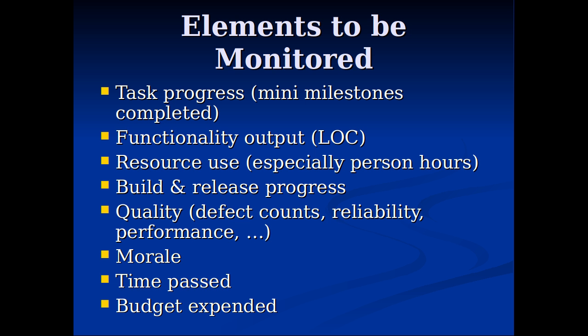Murphy's law — we sometimes just miss complexities. We'll talk about ways to avoid missing some of those in later lectures. Build and release tracking: how many builds have occurred in the past day? How many check-ins? How many of those broke? Defect counts — the project managers are going to want to keep track of defect counts in a big way. Is a small defect count a good sign or a bad sign? It might be a bad sign — you just haven't found them yet. Often there's worse before better: before you can get better, you've got to find the defects.